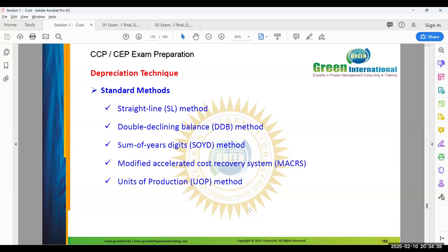No, you will take the depreciation cost. So if the crane is used in one project for 3 years, for that particular 3 years you take the depreciation. Understood in the project.